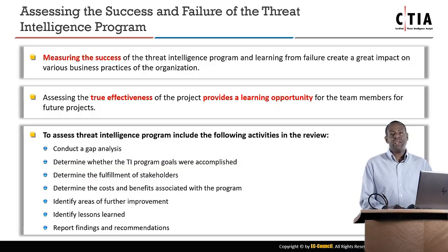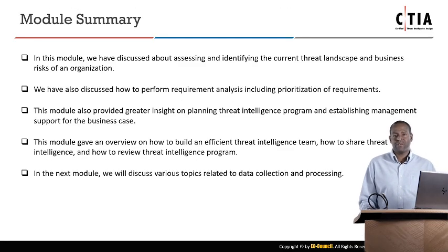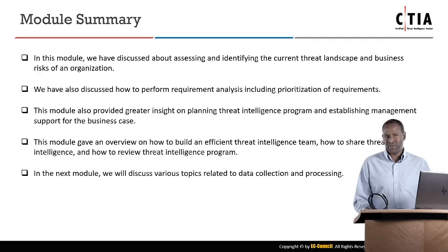Lastly, report findings and recommendations. What I would do with findings and recommendations is not only report it, but have a findings and recommendations meeting. Because the project is already implemented, it's less likely that upper management will read your report. So you involve them in a meeting with the report, go through the report, and make sure that they understand all of your findings and recommendations. And then you can call the project ended and successful.